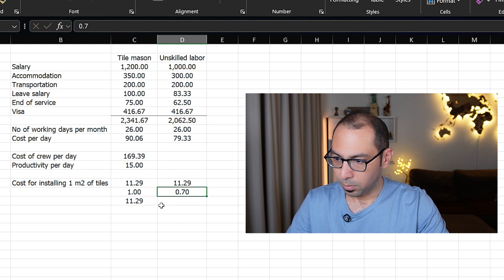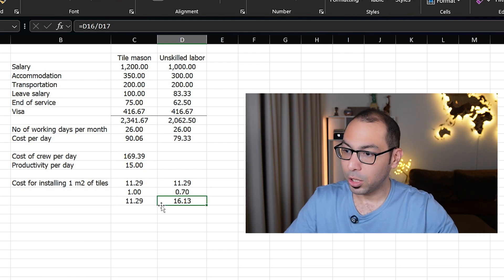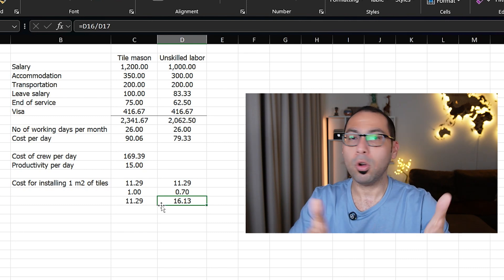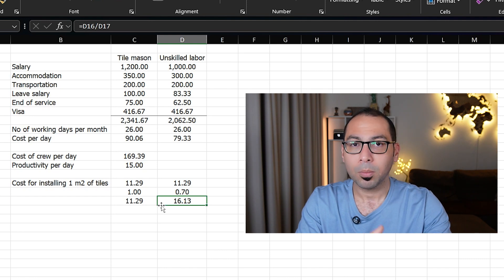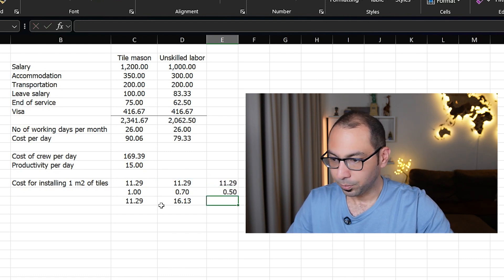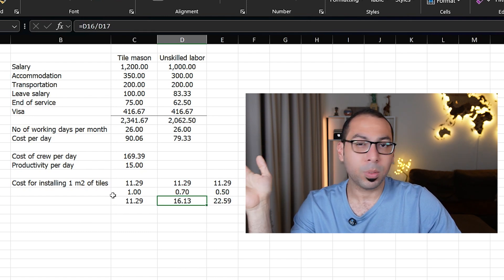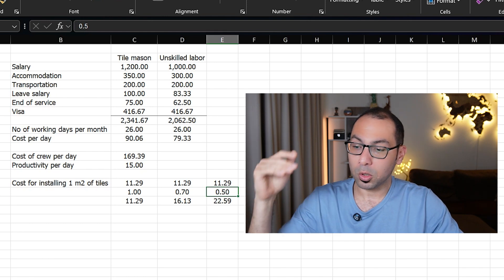If they are working only 70% of the year, the cost per square meter increases because you are still paying salary, accommodation, and all other costs on idle days. At 70% utilization the cost becomes 16, and at 50% utilization it rises to 22. It is the job of the business owner or project manager to make sure that the laborers are always busy and always have something to do.